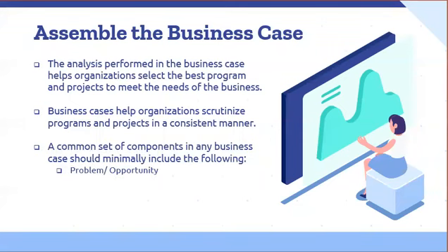First is the problem or opportunity. So specify what is prompting the need for action. Use a situation statement or similar way to document the business problem or opportunity to be addressed through a program or project. Include relevant data to assess the situation and identify which stakeholders or stakeholder groups are affected.